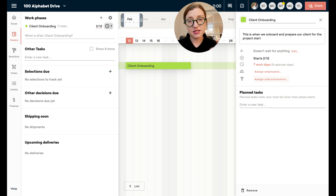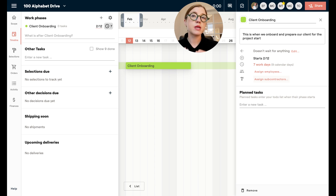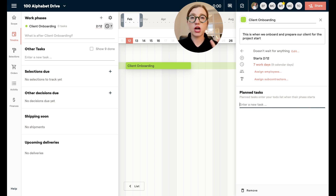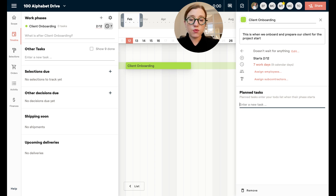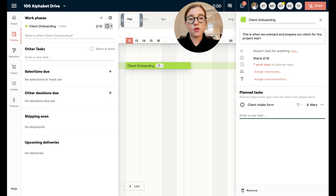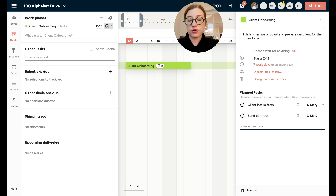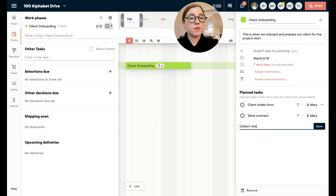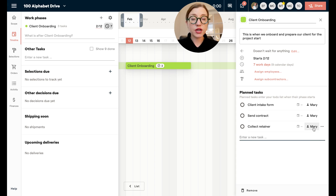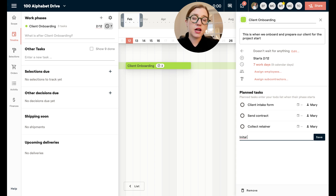Under this client onboarding phase there are going to be things that I want to do each time — we're going to call those plan tasks. Plan tasks are things that when we sit down to set up the project from the beginning, we're thinking about what we know is going to happen. So I want to do my client intake form, send the contract, collect the retainer — and these are things we know are going to happen during client onboarding, like an initial consultation.